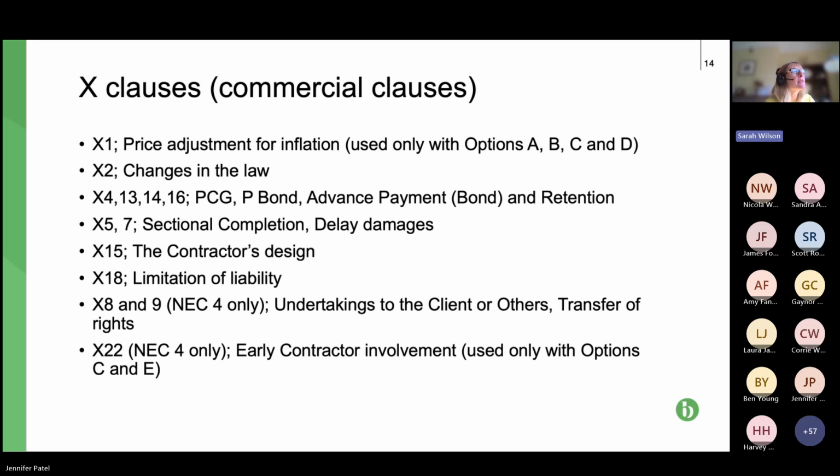This is only optional because in some instances a contractor might be engaged under an NEC without having any design liability. Effectively, the paying party has engaged consultants to carry out the design, and the contractor's work scope is just to do the work, i.e. not to design.